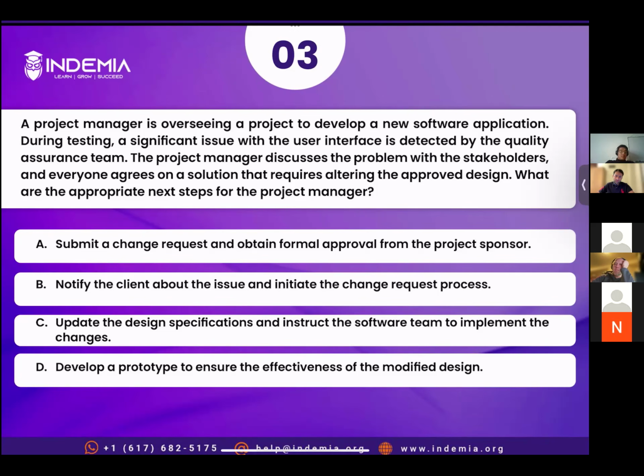Yeah. All right. But Mohan, to develop a prototype, do you need some time, some resources? Do you need to change your baselines or no? Right, right. So even if you need to develop this, you need some sort of resources, you need some sort of approval. Anything that you're doing outside of the baseline, you require a change request, right? You need to follow the procedure, as Daniela mentioned. So you're right, it would work, but for that you need to have some resources, and for that you need approval. Okay, good. Let's take one more comment.